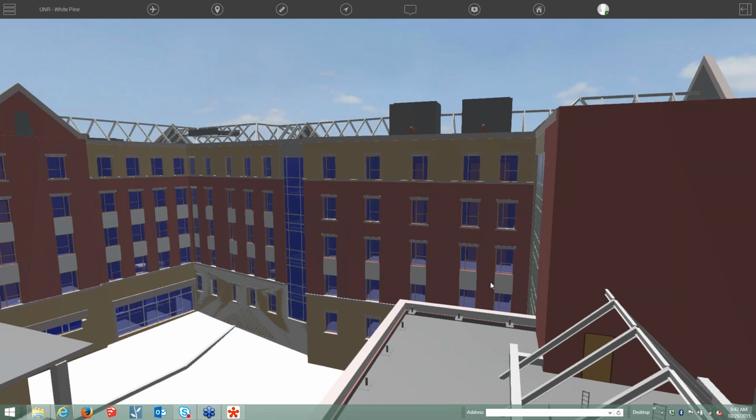So what we do, it'd be on the drawings, but usually on the jobs where we do our own coordination, say for another job, it was a school, I went ahead and did the coordination for the overhead. So any of those changes we made to make the ductwork and pipe actually fit, when there's not enough space overhead and we have to change up the piping and all that, that's when we actually make the contract say installation will go to the model. So the model will actually be the thing that's in charge. What people are looking at is the model.